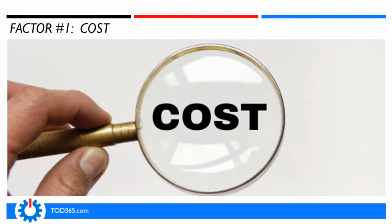Next, the next big item. We have had companies that have literally received quotes from a half dozen or more partners on their upgrades. One of the large enterprise companies that I work with came back with quotes that were literally from $400,000 to the $5 million range. Anytime you get that kind of disparity in cost estimates, something's wrong somewhere. Somebody has missed the boat.